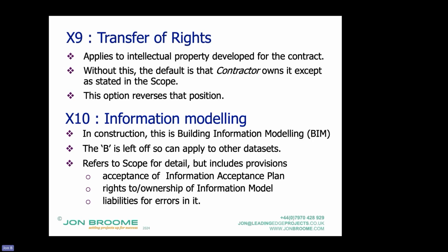Rights to ownership of the information model. It's the client. And liabilities for errors in it. If everybody who is involved in this project is contributing to it, then the default will be that the client owns it. So if a consultant's developing it and then the contractor's adding in information, but what the consultant's put in is defective, then if you like, it's the client's risk.